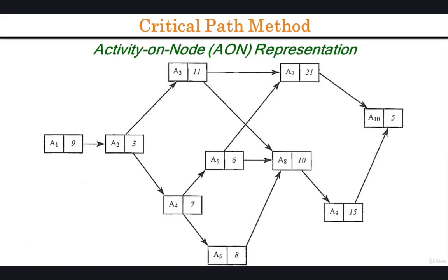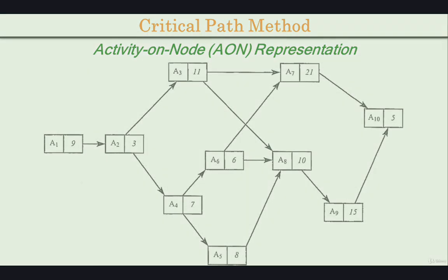Next, we look for any other activities in the dependency matrix that has all its information providing activities completed and go back to step 1 until we have worked ourselves to the last activity. If we repeatedly execute these 3 steps, we obtain a graph as shown in this figure. This graph provides a practical and visual way to illustrate the evolution of the project.